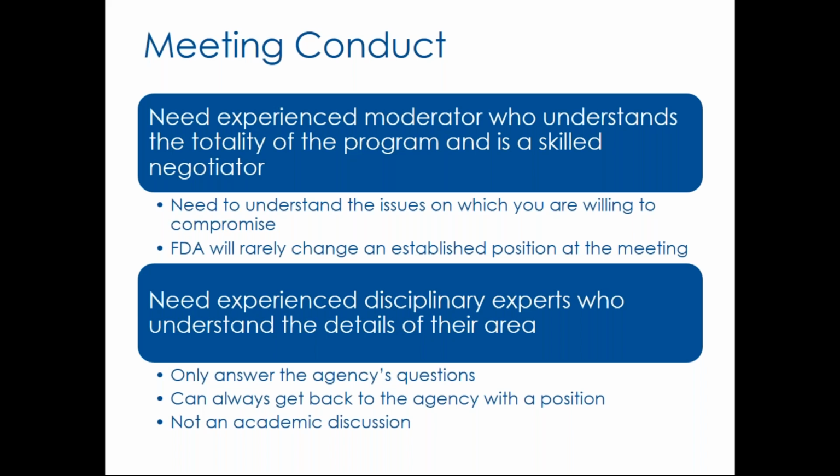As Kevin said, you will have received the FDA's initial responses before you walk into that room. Hopefully you have winnowed those responses down to the 5 or 6 critical ones that you need to address and get resolved in this meeting, and the others can just be put to bed very quickly. And you can go in with a slide deck prepared that only has the critical issues on it and just say everything else in the initial responses from FDA are acceptable.